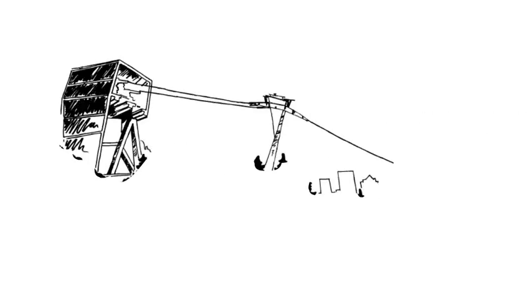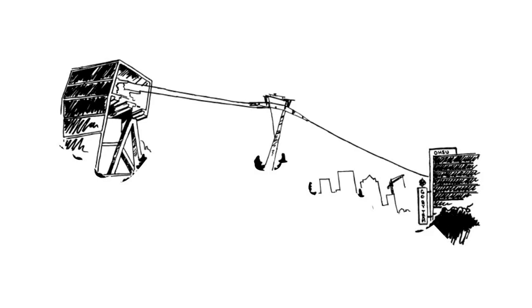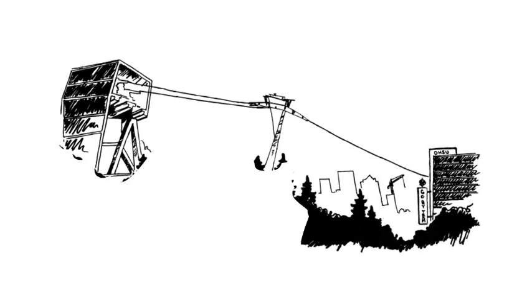Phase four is called unrigging and unstaging, also known as packing up. Once all four track ropes are shifted, the final tensioning and adjustments will take place, followed by testing and final commissioning.